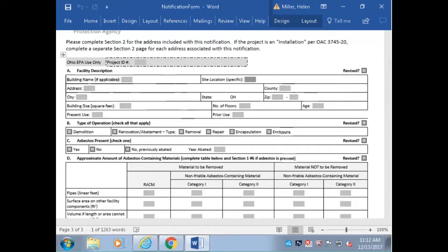If there's one address for the whole condo complex, and it's building A, B, C, D, or whatever, then they only have one address, and technically it's only one address to fill out. But like many condos, there are roads and streets running through, and they have different addresses for each little condo section of 2 or 4 or whatever it might be. If that's the case, then you'll be putting those down on separate addresses, and they'll be looked at like we do now.